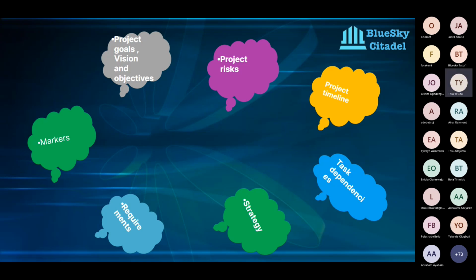Requirements, and I'm sure that's a familiar terminology to even the BAs and the Scrum Masters. So you need to get information to outline your needs, the user's needs, the business needs. So you want to talk to your sales team, you want to talk to your customer service group, you're talking to stakeholders and the business. They need to know how your end users feel about the product. What are the needs? What are the requirements? What are they looking for? What are the different feature requests that the business has, that the users have? That would help you to determine the different features that need to be prioritized within the different releases.